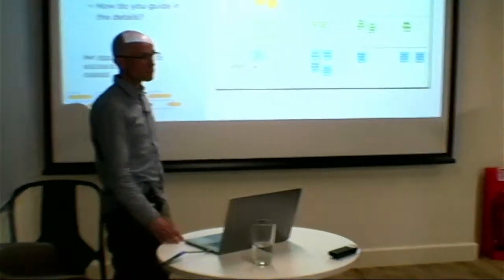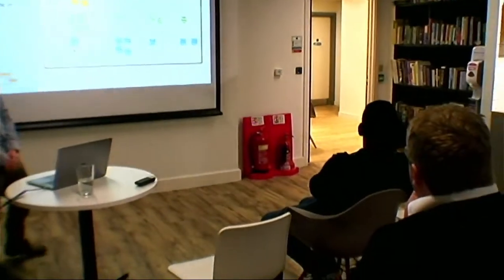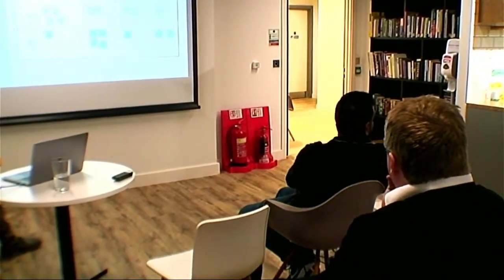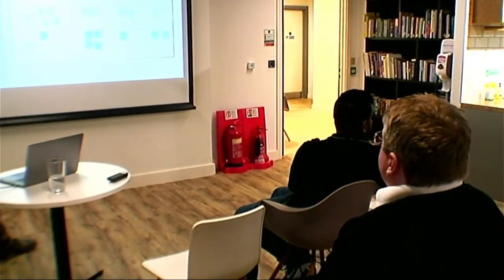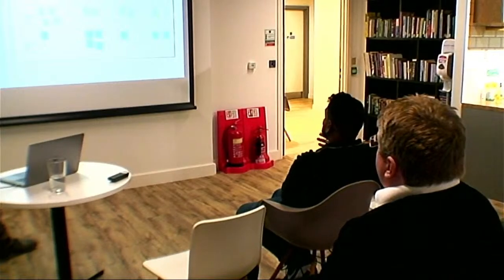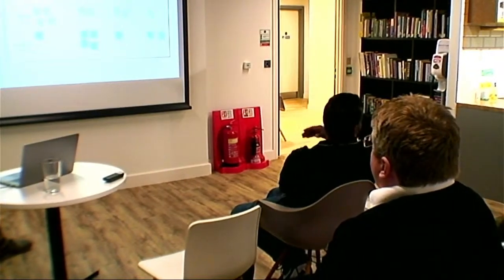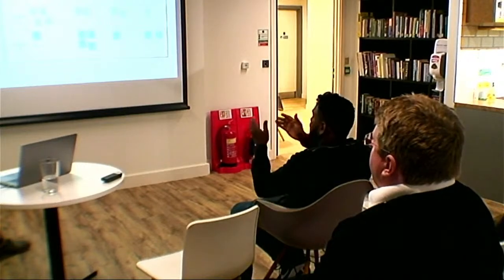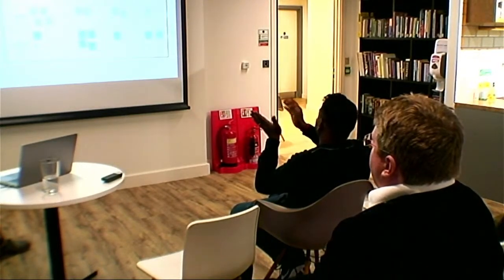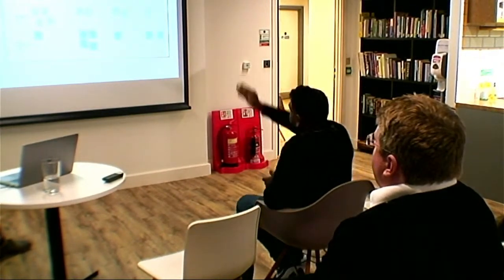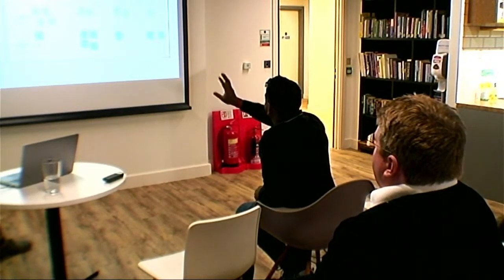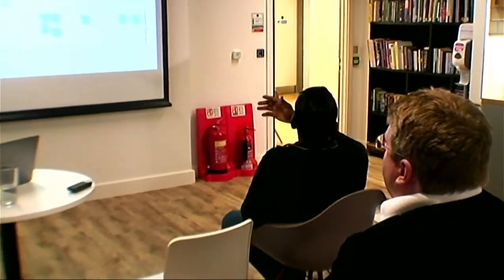Basically, your proof of concept should be end-to-end working for your customer. If it's customer facing, the proof of concept can't be just finding an event, because that's not something you can send to market. That's why, if you look at the waterfall approach, for example, we go horizontal and build the whole find-event thing, all of them, first. Exactly. And obviously that means you can't launch it.